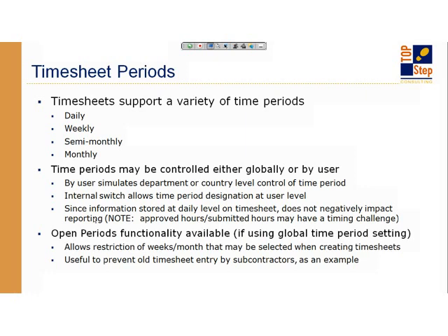If you are using something like a weekly timesheet, there are a couple of functionalities that I find instances for, based on people who use a lot of subcontractors. Specifically, it's something to prevent subcontractors from putting old timesheets in the system, where the time is so old you can't bill the customer for that time or pass through that time. It's really enforcing the policy that you really, really should get your timesheets in on time. That's a requirement. And if you wait 3 months, you're not going to get paid as a contractor because we can't recoup that fee. Okay?